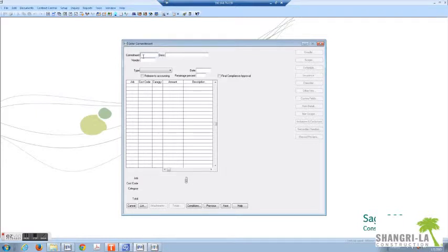Typically that number will be the job number, for example 140170. Our job numbers, as indicated in a previous training, start with the year. This would be 2014 plus the chronological number of the job that has been issued. So in this case, this is the 170th job of 2014. And then there's a dash, and then the cost code associated with this commitment.